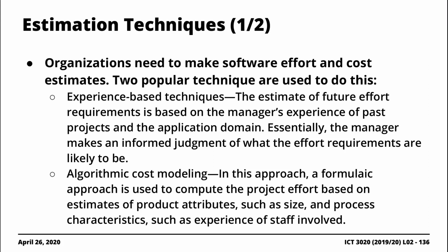So there are a number of techniques that are used to estimate cost and project schedules. But of these, two of them are popular, right? So there's the experience-based technique and the algorithmic cost modeling technique, right? So in the experience-based technique, what we'll be doing is using analogies, right, to try and estimate exactly how long it's going to take and how much it's going to cost you to undertake the project.